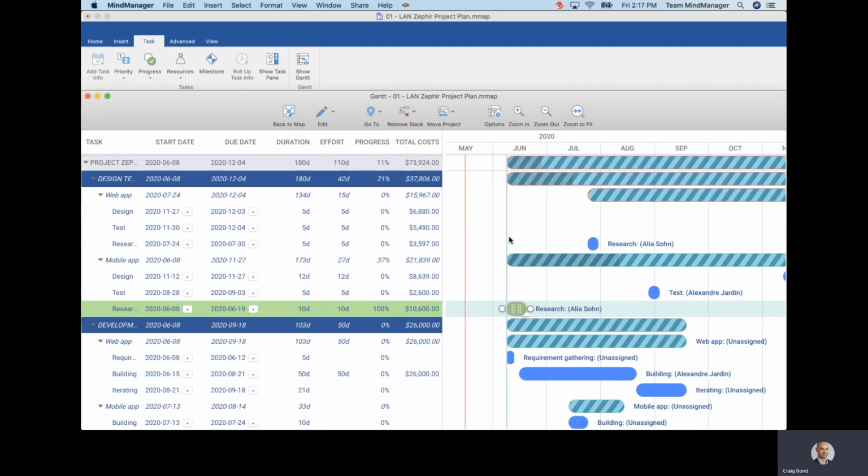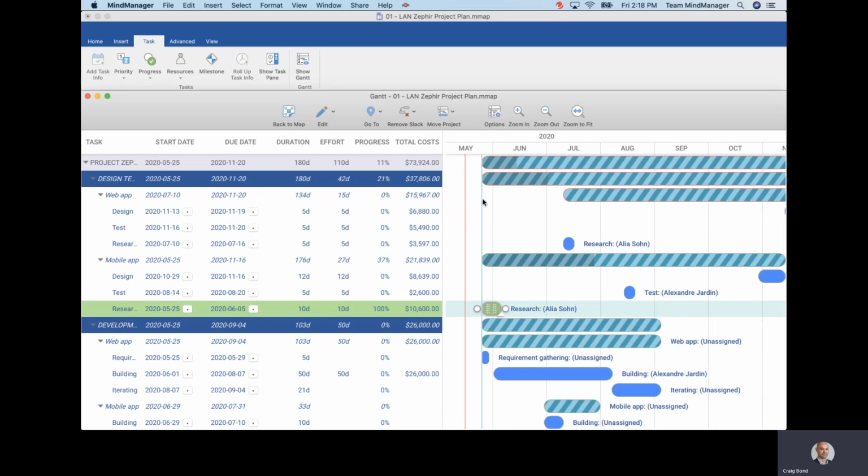And we're ahead of schedule, so I'm just going to kick off the project a bit early here. So I'm going to click up here, move project, change the start date. We're well on track. Just going to update that. And instead of having to do every task individually, I'm just going to do it once, and that's going to update for me with a couple clicks.